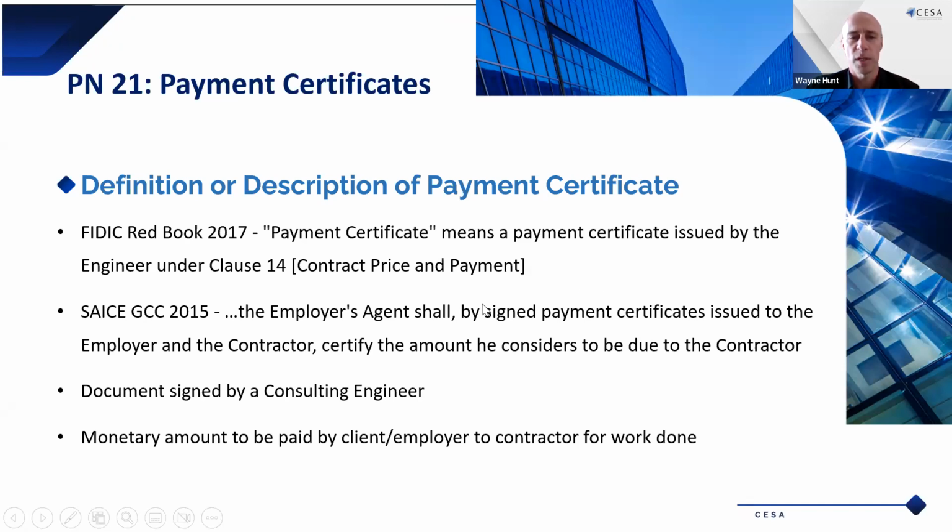So it's a document which is signed by the consulting engineer. It is then given to the client and employer. That is the determination of the work that's been done, the value of the work, and then that becomes payable by the client to the contractor.